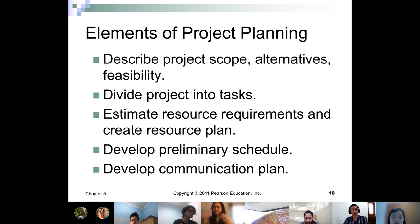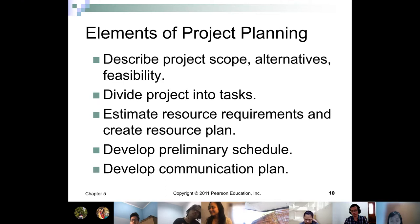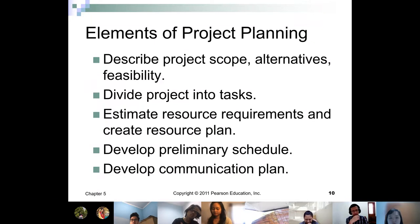The elements of project planning: first, describe the project scope and alternative feasibility. The project scope must be done in writing and approved with signatures by all key stakeholders. Why? Because this is the first step to ensure the project can be done on time and within budget. There is a phenomenon in any project called scope creep.